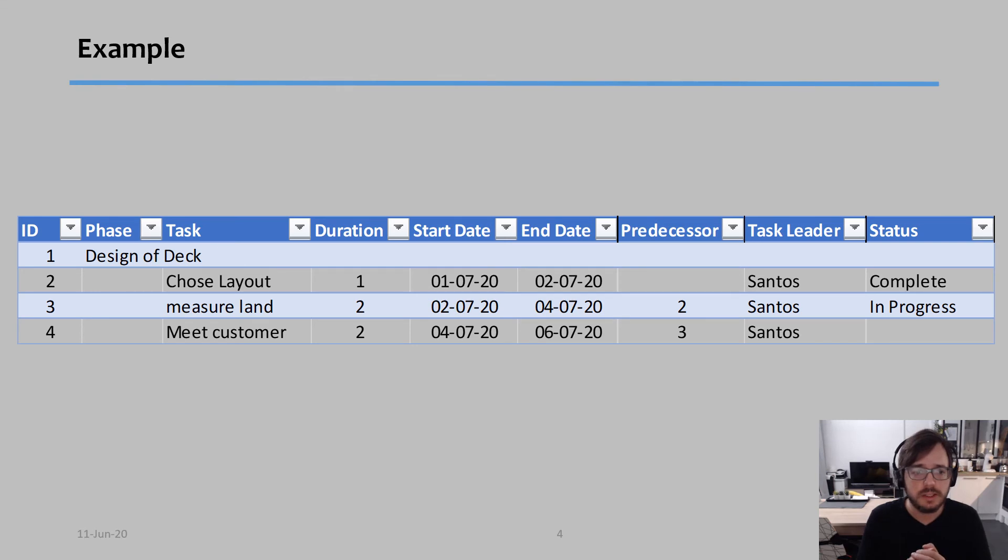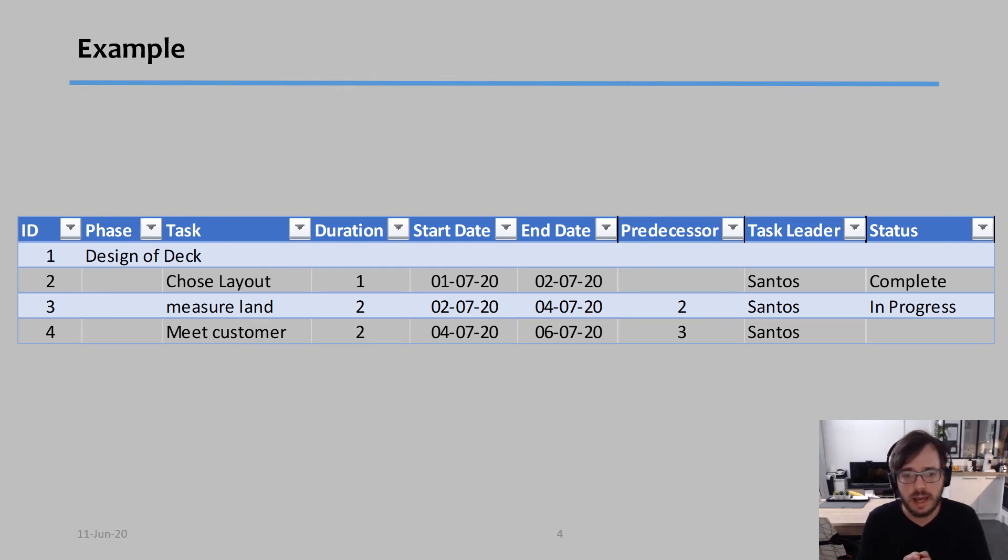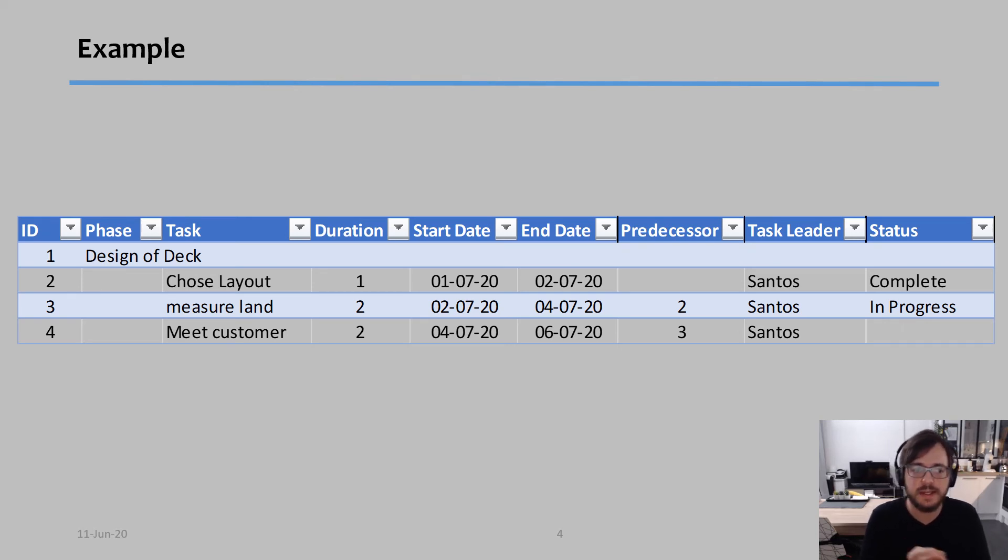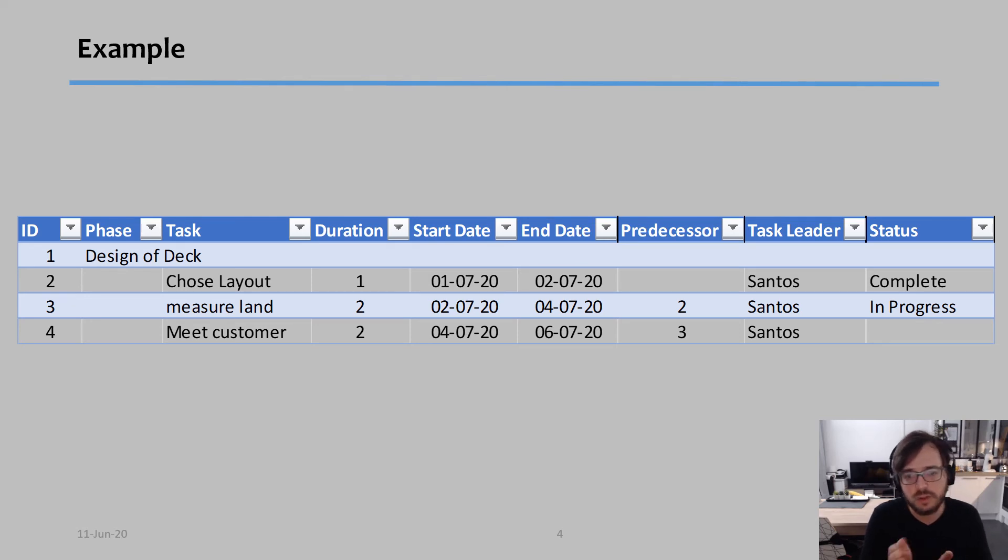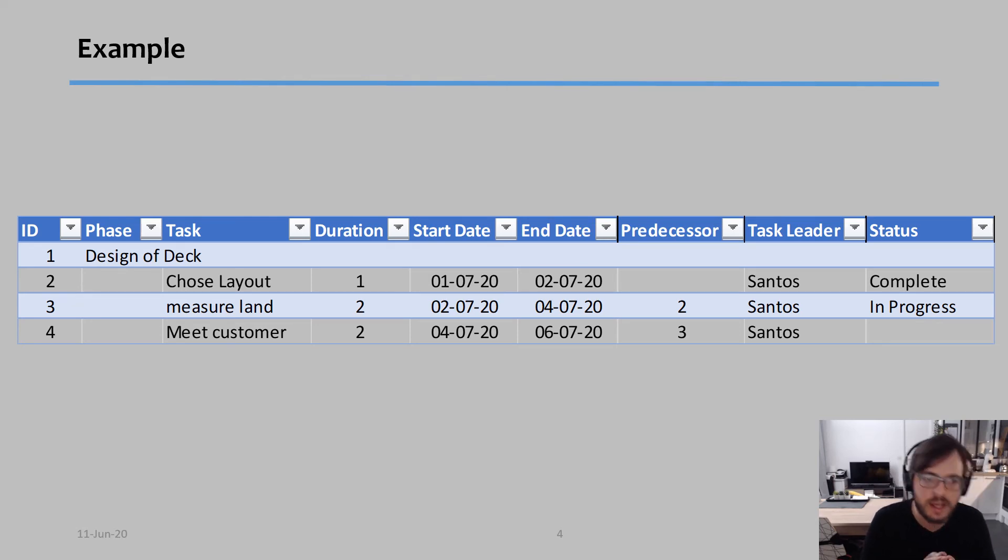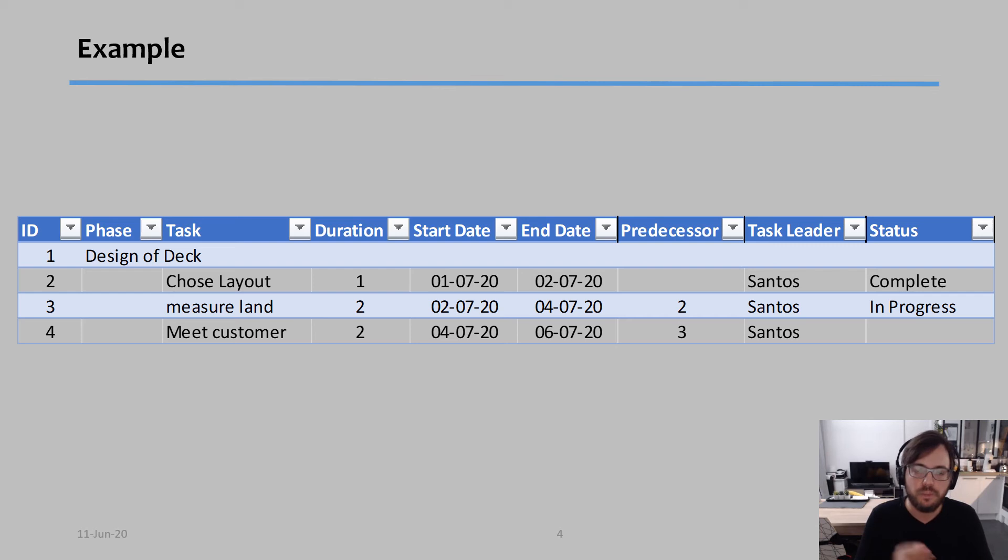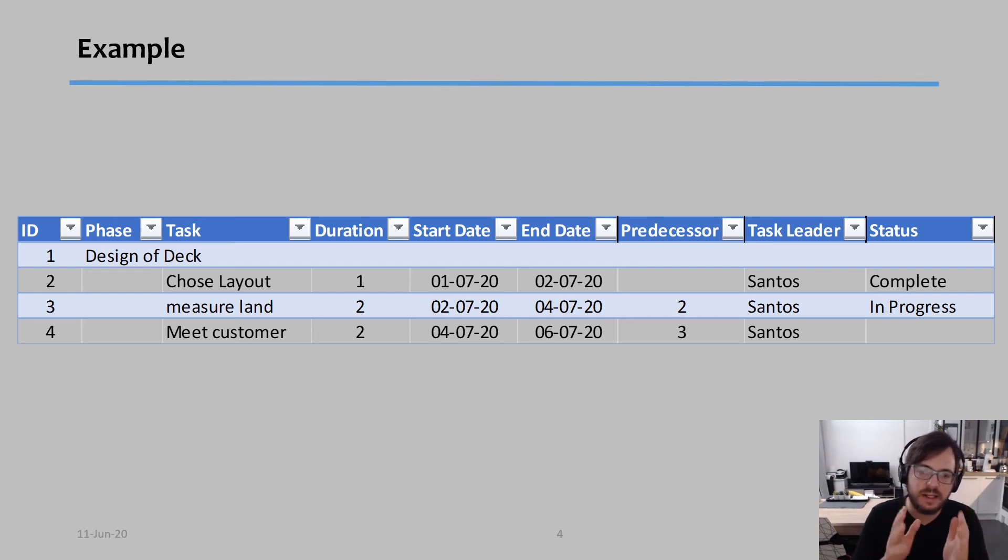So in this case, if you notice, task two, I started it on the 1st of July, lasts one day. So I finish it on the 2nd of July. That means I can start task three on the 2nd of July, lasts for two days. So it goes until the 4th of July. 4th of July, I start task four. Task four lasts for two days. So it lasts until the 6th of July.